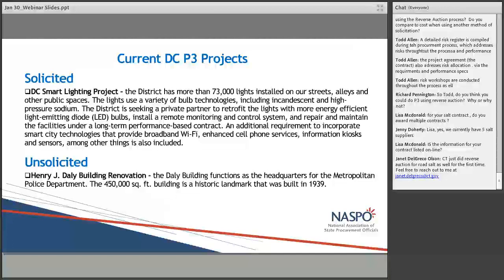And Richard, to answer your question on our end, when we talk about the RFP process, there are several steps. It's not just them responding to an RFP. We issue the requirement to the shortlist, and there are several one-on-one meetings during this process before they submit their final response, where they ask questions about the agreement. Again, this is a partnership, so there must be a meeting of the minds, and allocation of risks is discussed. So the requirements are defined and discussed as we move forward and may be refined as we move forward.